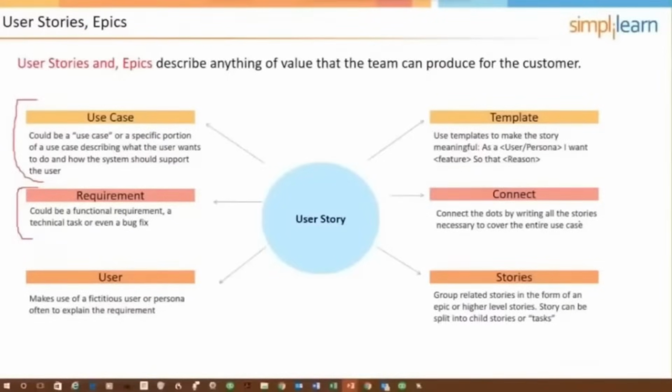And so the priority of the user stories in the backlog, while it might start with just simple functional user stories coming from the product owner, will evolve until it includes some other things that are also considerations when it comes to priorities, because of successor, predecessor relationships, dependencies, and things like that.